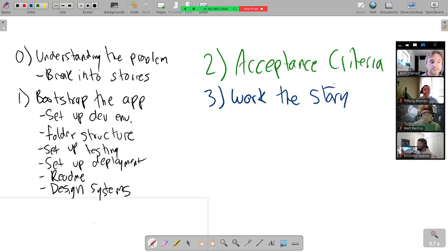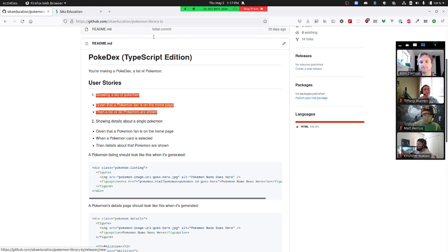Most common first step of this in agile environments, including at Ford, is figure out your tests. So tests are just the code version of your acceptance criteria. So like, that's acceptance criteria.